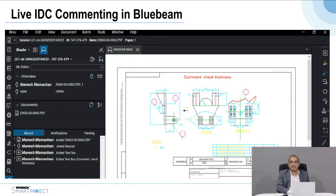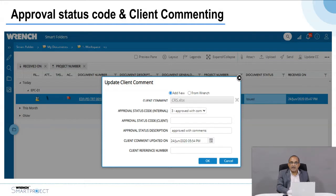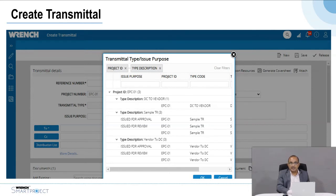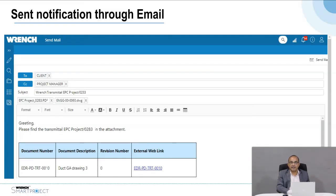For collaborative commenting — the IDC process — comments from one resource can be seen by other resources in real time, and consolidation happens automatically, attached to the particular drawing when commenting is completed. The client can specify the approval status code — approved, rejected, or approved with comments. These comments are sent back through a transmittal along with the drawing to the contractor, automatically generated from the system. The contractor receives notification by email or can download the drawing directly via an external link.